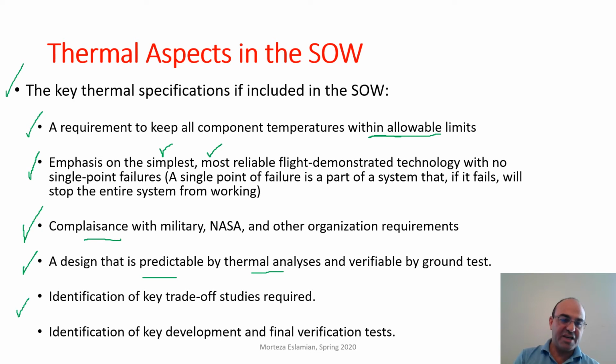Identification of key trade-off studies required. This statement may ask the contractor to provide trade-off studies. For instance, they may want the contractor to perform analysis to compare multiple thermal solutions in order to choose the better one.